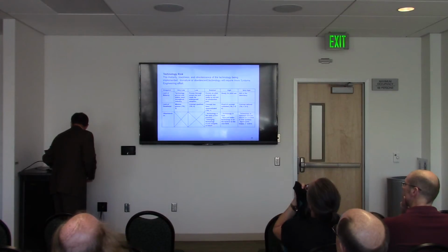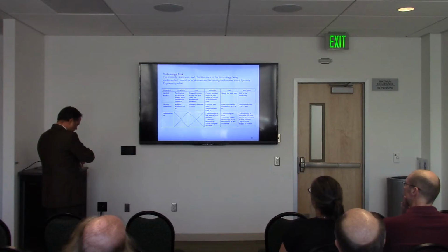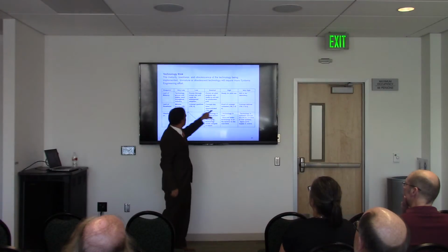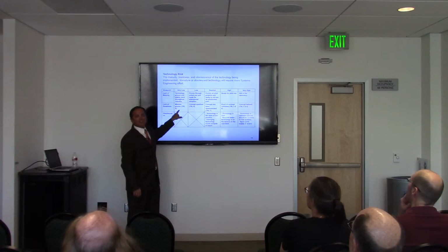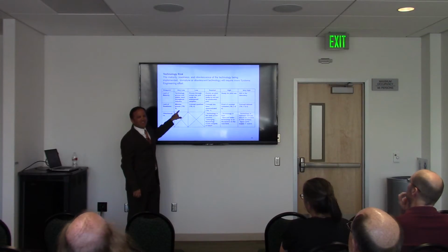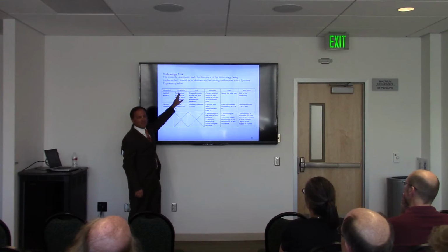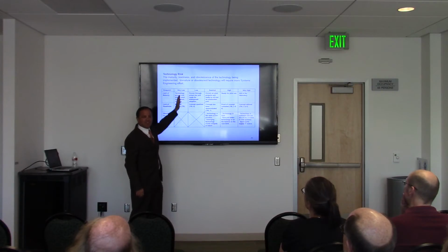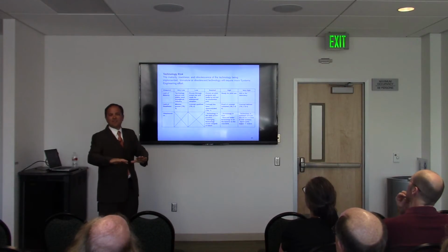So let me actually talk about the technology risk cost driver, just to give you a better sense of how this is quantified. So here's the NASA TRL scale. Again, if you're at level 9, it means that you are ready for launch. There's no additional testing or R&D needed, right? So this translates to a very low risk in your project, on this end of the scale. So if you characterize your project as having this level of technology risk, cost goes down.